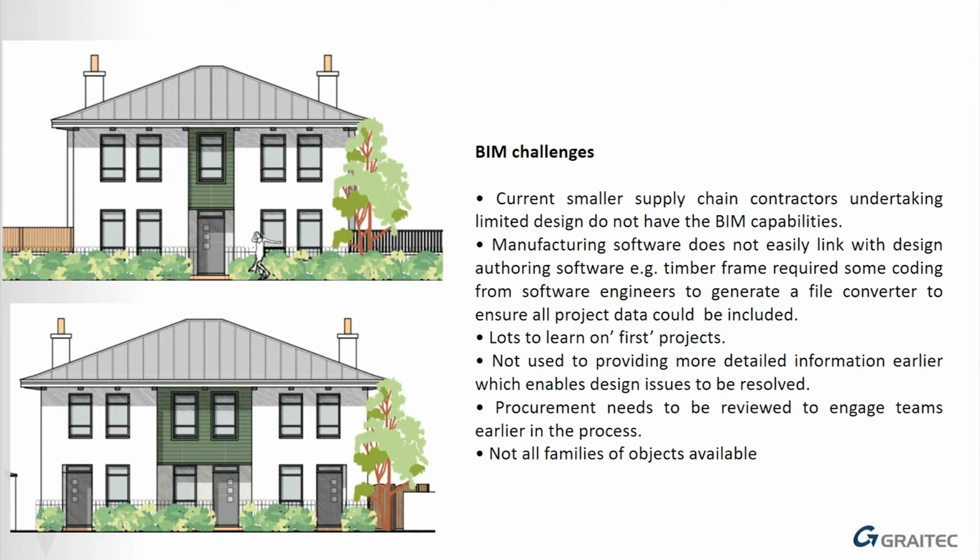And because at an early stage the schedules and the quantities were so accurate, they were getting a much easier ride from looking at, right, this is how much material we're going to use, how can we reduce the waste? We're not going to get to site and order too much because our quantities are so accurate to start with. So again, these were ways that they were saving money on the whole project.